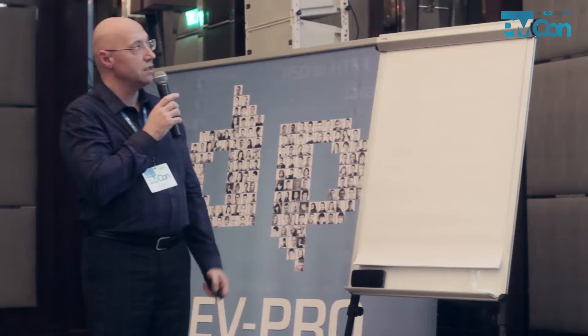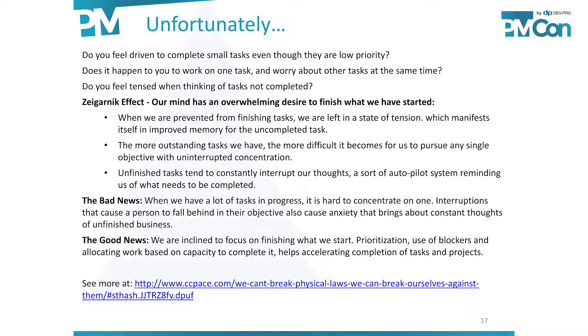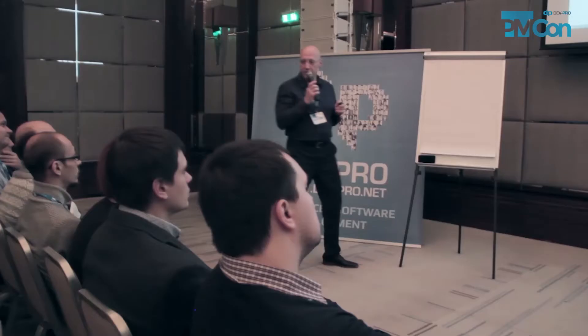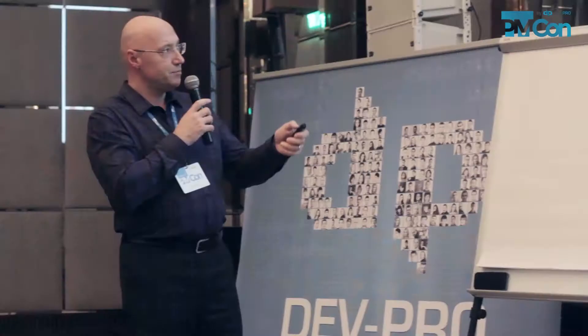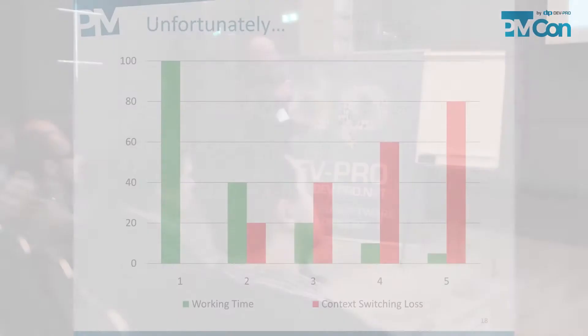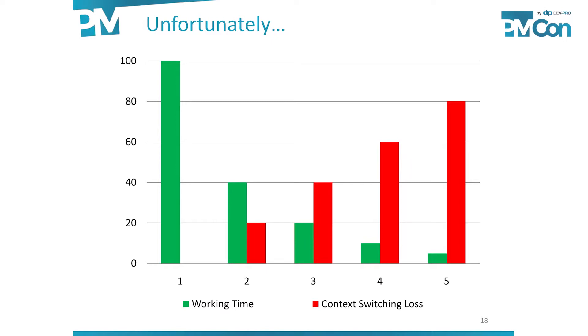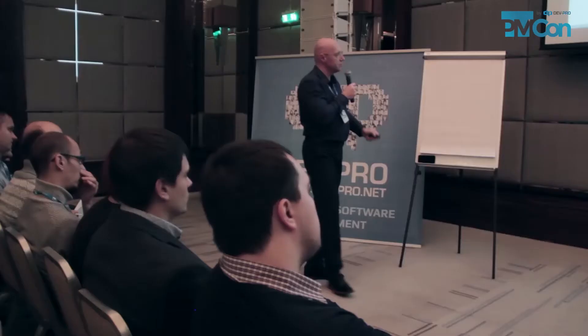We think we can multitask — employers even look for people who are able to multitask, and I put it on my resume years ago, probably that's how I got the job at Microsoft. But science proves that when we work on one thing we focus on it 100 percent. When we try to do two things at once, we don't really do two things simultaneously — we do a little bit here, a little bit on something else, and go back and forth. There's a 20 percent cost of attention that goes to context switching, and that cost grows exponentially. Everything seems to take longer and longer and we're not able to finish anything.